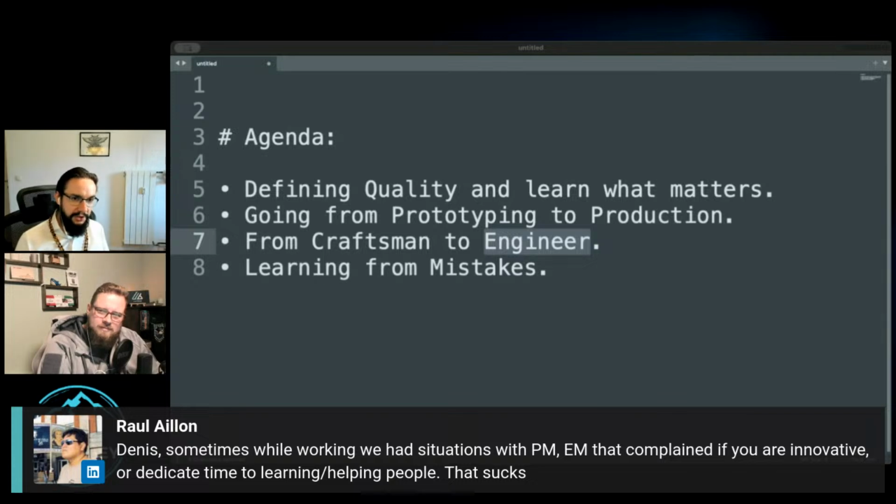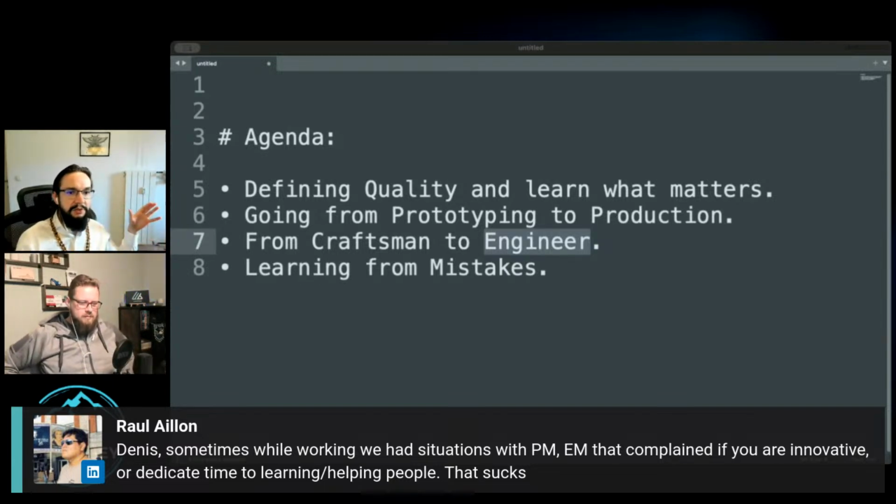That's what continuous integration is about. That's what continuous delivery is about. That's what trust is about. Rather than me speculating every single day, every single meeting, you get it down to the cadence of, no, this is what we accomplished yesterday. Right? So yesterday we were done with X, and X is 0.7% of the total project. That will give you a vague idea of how we're headed. And usually they will say, okay, cool, but I'm worried about our pacing.